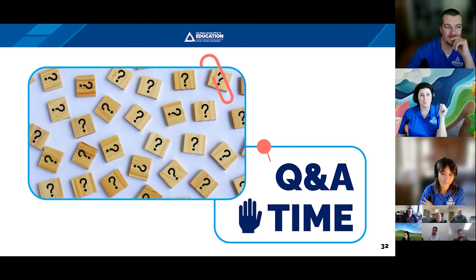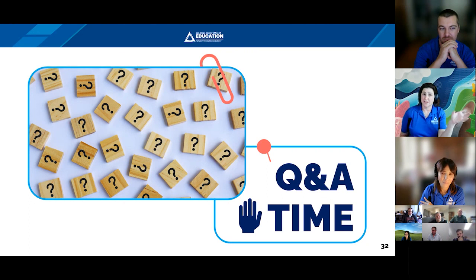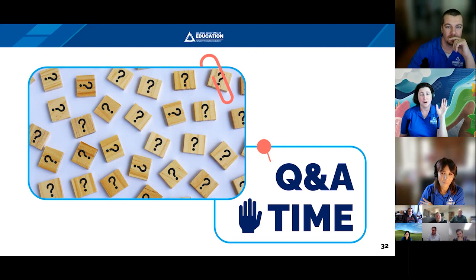As the PM just personally handling all of it, I would definitely, if you have any possibility, try not to schedule several big projects on top of each other. So we rate our projects as level 1, 2, or 3. Level 1 and 2, we're just helping somebody else do it. Level 3, we're taking on all the responsibility. I will wholeheartedly admit that having 2 or 3 big level 3 projects on your plate at the same time is not very sustainable.